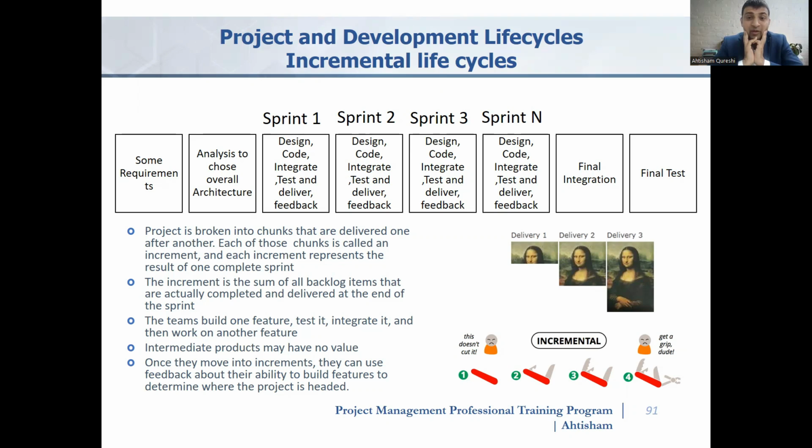And we have to incorporate this change, and we have to change our baselines, our plans, because this is a change in design, and change in design means we have to add additional work to change the design and to actually then build as per the new design. So we have new work items, new people need to work on it. So we will have to invest more money and time. Correct? This is your point of view.